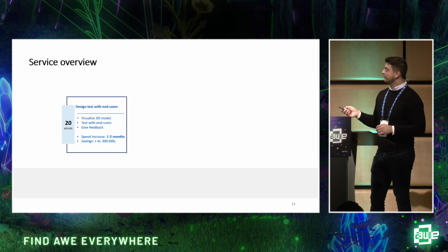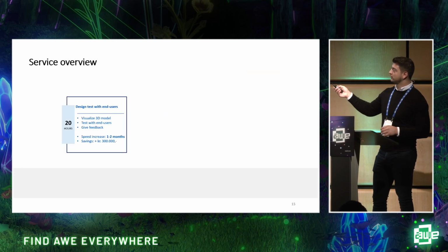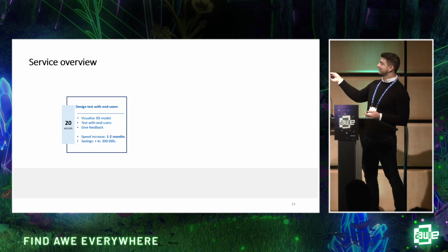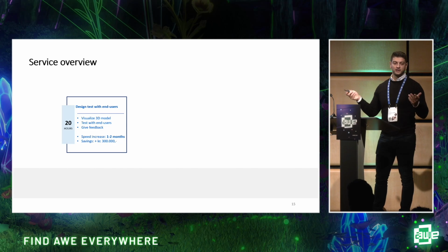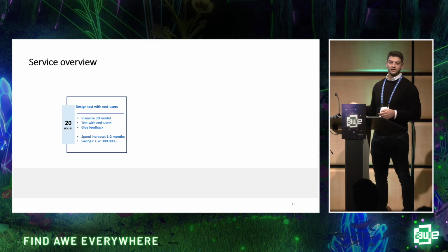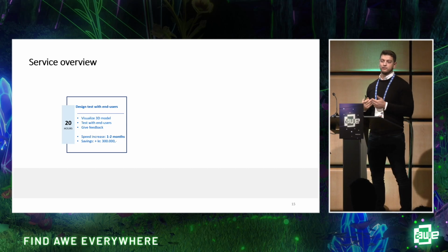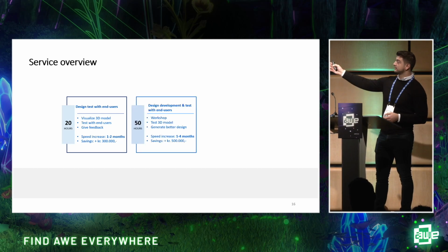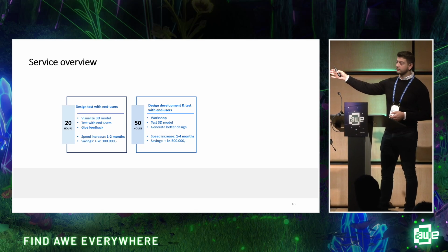Before we go to Q&A, we just want to give you a service overview, what you should expect if you do this at your own company. For a single design review with maybe 20 end users, you're looking at investing 20 hours, even if you buy it from a company like me or you learn to do it yourself. But you can save months in the design phase.